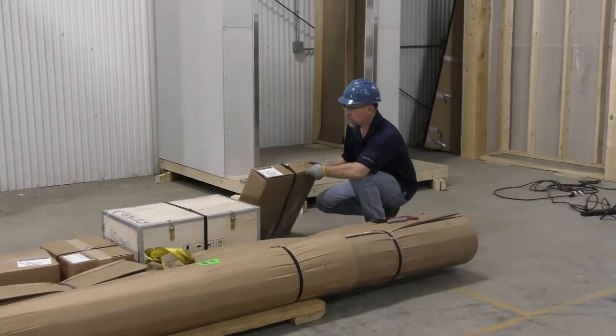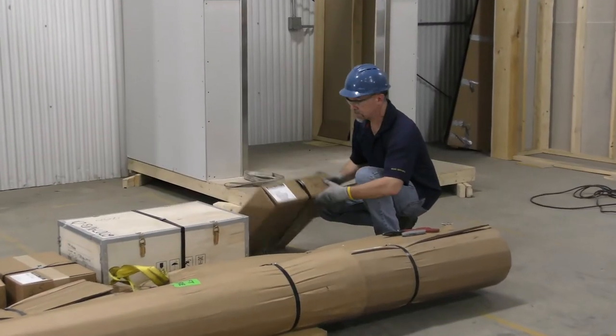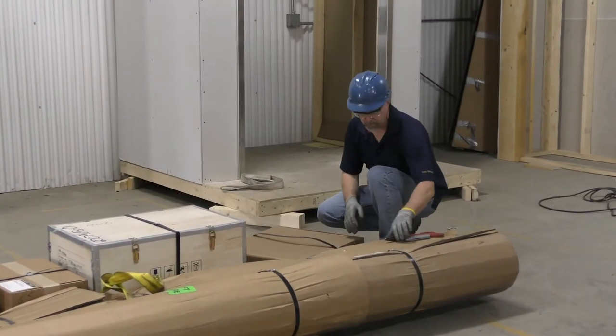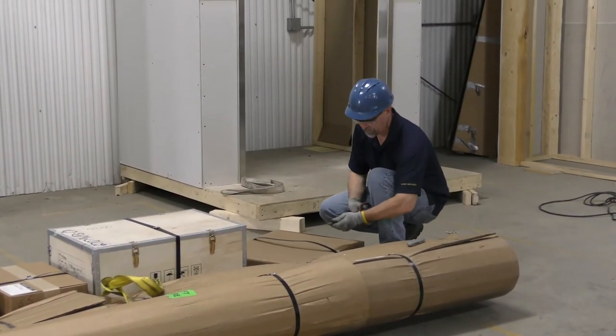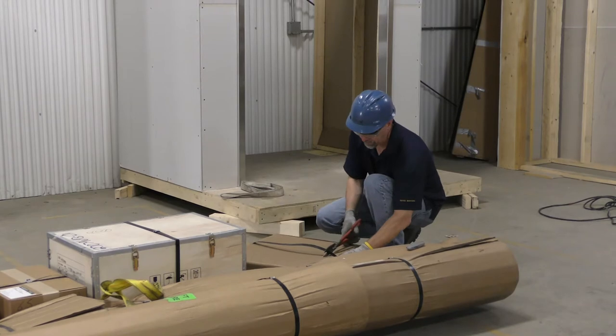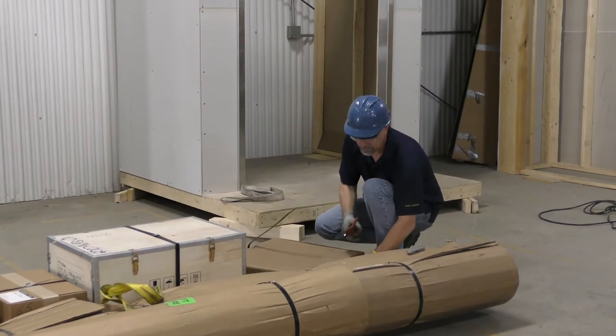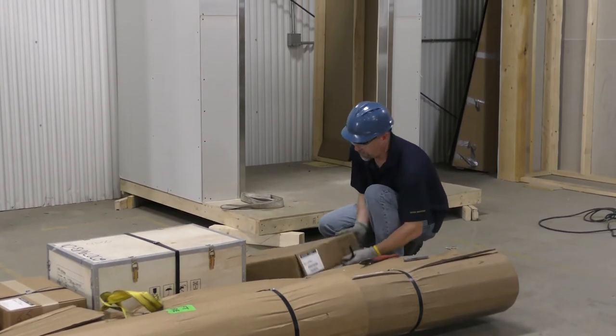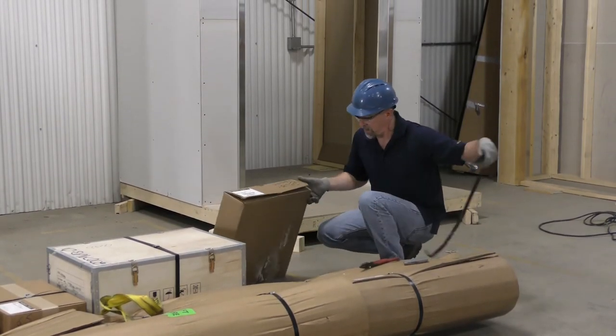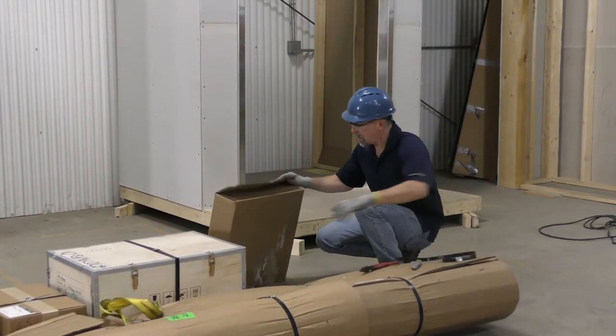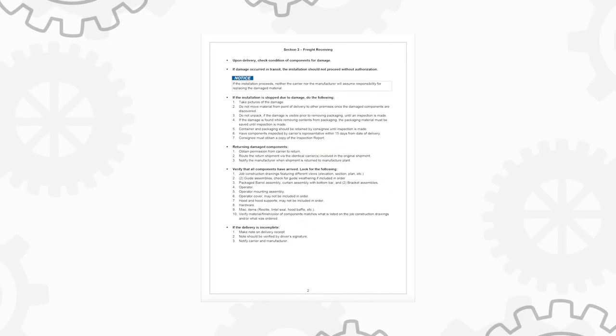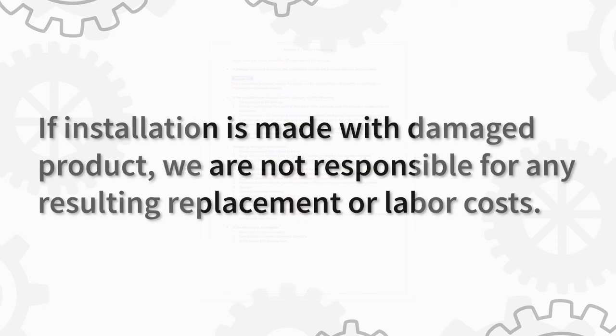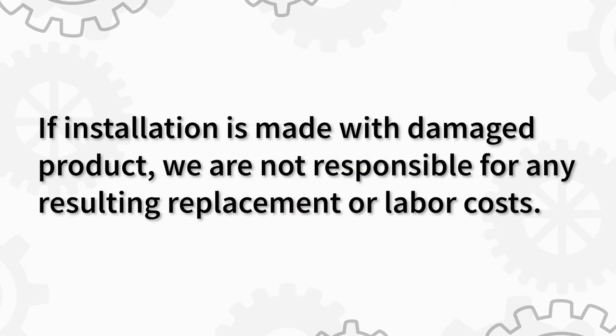As you unload the different pieces, check the condition of them for any freight damage visible or concealed. If there is any freight damage or the delivery is incomplete, please follow the procedure outlined in the installation and maintenance manual in order to correctly address any issues. This is very important because if the installation is made with damaged product, we are not responsible for any resulting replacement or labor costs.